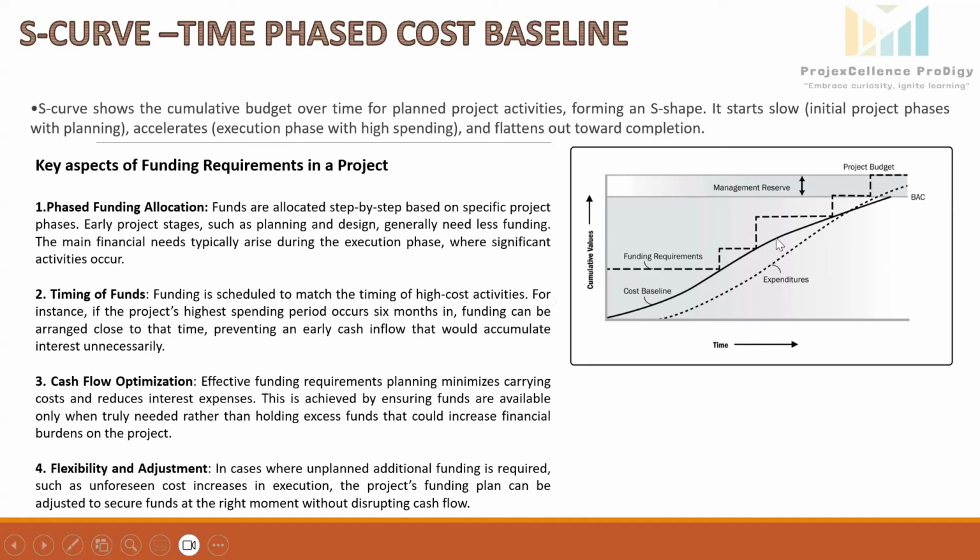Timing of funds. It means scheduling money to be available when costly activities happen. For example, if the project's biggest expenses are in 6 months' time, funds can be arranged closer to that, which will avoid early cash that could add unnecessary interest cost.